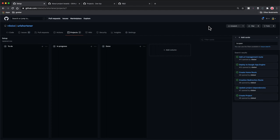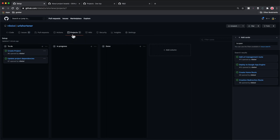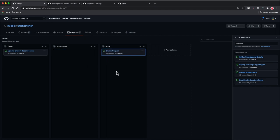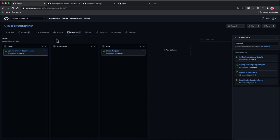Now that we've created the project, it has automatically created three columns: to do, in progress, and done. These can then match up to the different phases that an individual issue might go through. There's a lot of flexibility here — if you need eight columns, you could; if you want only two, maybe just in progress and done, you can set that up however you want. So I'm going to grab the "create project" issue and move it over into the to-do column, then grab the "update project dependencies" item. Now I can see that in the setup phase of the project, those two issues are still in the to-do phase. If I started working on "create project," I could drag it over into the in-progress column, and when completed, move it to done. And we could also move things backwards if needed, because we know these things are not always linear — oftentimes we're moving back and forth between different phases as our project develops.